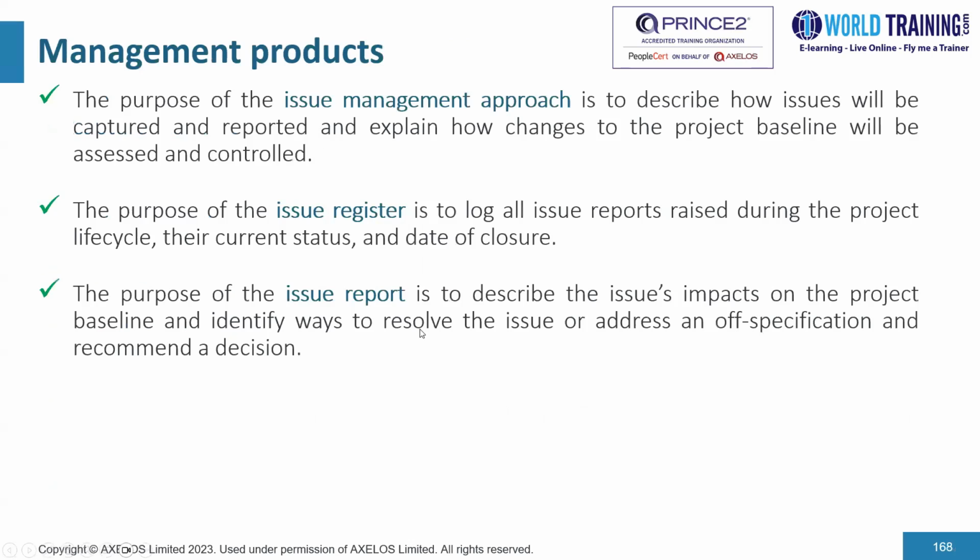And what are the relevant management products? We have 3 management products. One is the issue management approach. Its purpose is to describe how issues will be captured and reported and explain how changes to the project baseline will be assessed and controlled.